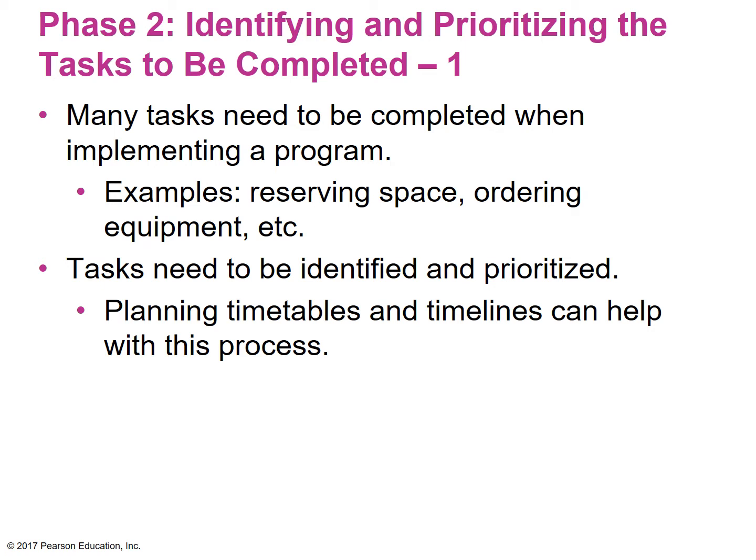So some things just take longer to do than others, right? So if you have to order materials, are there delays in shipping? Is there a lead time that's needed? If you're ordering things that have a particular logo, is there a creative process that you have to go through in order to create the logo, in order to brand the materials that you're ordering?